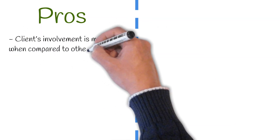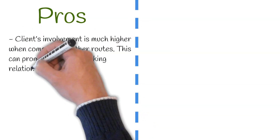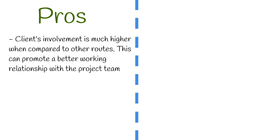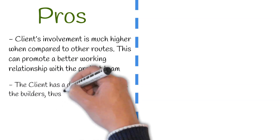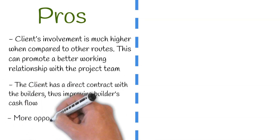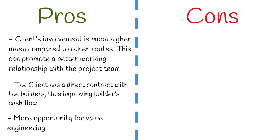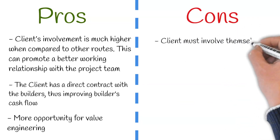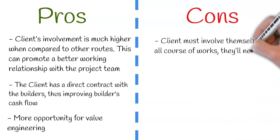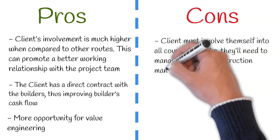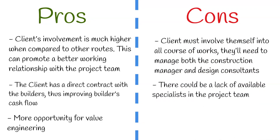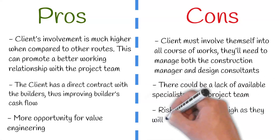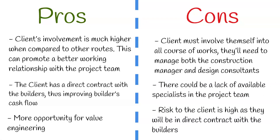Pros to this route include: the client's involvement is much higher when compared to other routes, which can promote a better working relationship with the project team. The client has a direct contract with the smaller contractors, thus improving their cash flow, and there's more opportunity for value engineering. Cons include: the client must involve themselves in all courses of works and will need to manage both the construction manager and the design consultants. There could be a lack of available specialists in the project team, and risk to the client is high as they will be in direct contract with the smaller contractors.